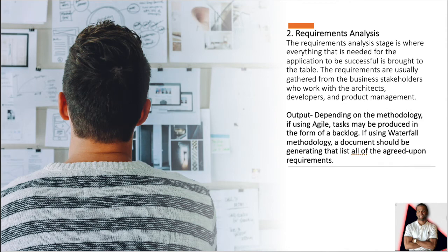The next step is requirements analysis. The requirements analysis stage is where everything that is needed for the application to be successful is brought to the table. The requirements are usually gathered from the business stakeholders who work with the architects, developers, and product management. The output for this step is, depending on methodology used: if Agile, tasks may be produced in the form of a backlog; if using Waterfall methodology, a document should be generated that has all the agreed upon requirements.